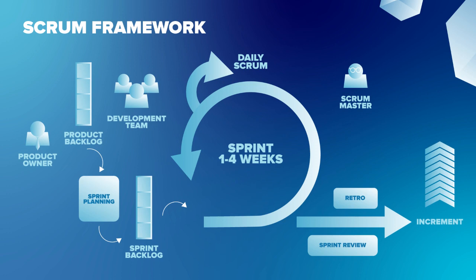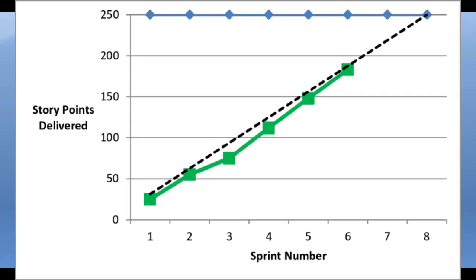Basically, friend, a burn up chart is a visual representation for the team of how much work has been completed versus how much work was initially planned for a release. For example, there were 40 tasks in the project, and we have taken 10 tasks that in that particular sprint we will complete. Okay, so the target release should contain the 10 tasks which were planned.